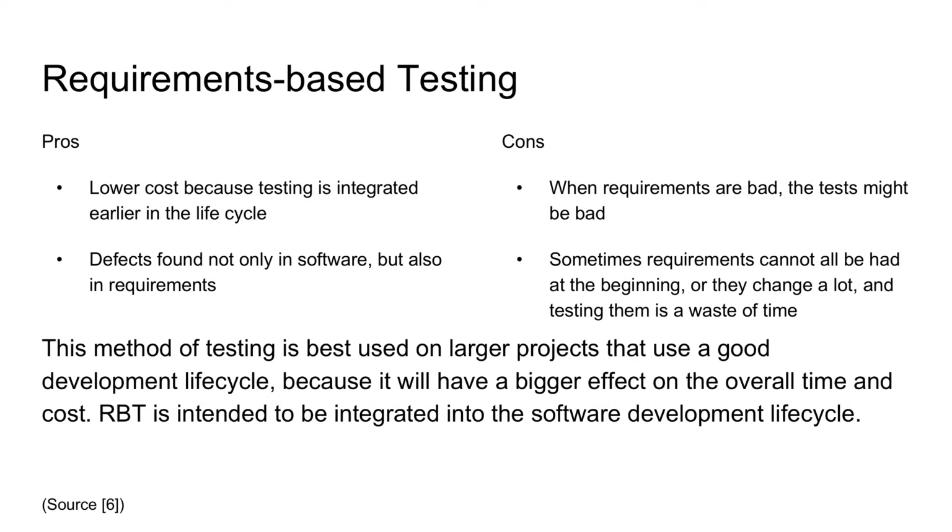Requirements-based testing has an emphasis on integrating testing throughout the development lifecycle, and focus on the quality of the requirement specification. The benefits of this approach are that the length of time required to engineer and implement a system is less, because quality testing is done from the very beginning, instead of after coding has begun. The reason this reduces the project time is because problems with requirements can be found early. If testing is done after coding has begun, and problems in requirements are discovered, then code has to be rewritten. This also has the effect of reducing the cost.